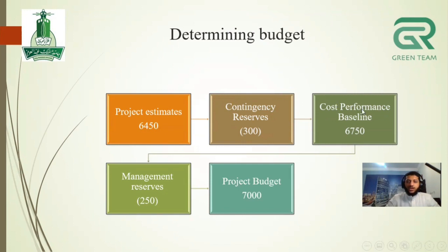So this is the final, or baseline, cost, which is 6,750 riyals, and this is the cost performance baseline, which is what we will work with in this project. And for the management reserves, we assigned 250 riyals, and this is an estimated cost.